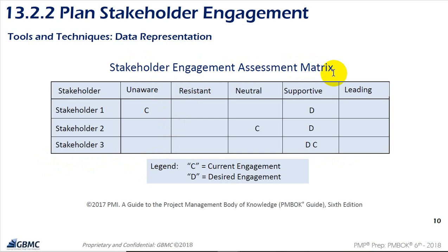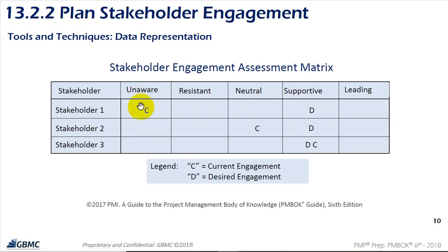The Stakeholder Engagement Assessment Matrix shows the current and desired engagement status of each stakeholder. For example, based on data collection and interviews, a stakeholder may currently be unaware but should move to desired engagement, which is supportive. Another stakeholder may currently be neutral but we want them to become supportive. A third stakeholder is already supportive, and we want them to stay at that level.